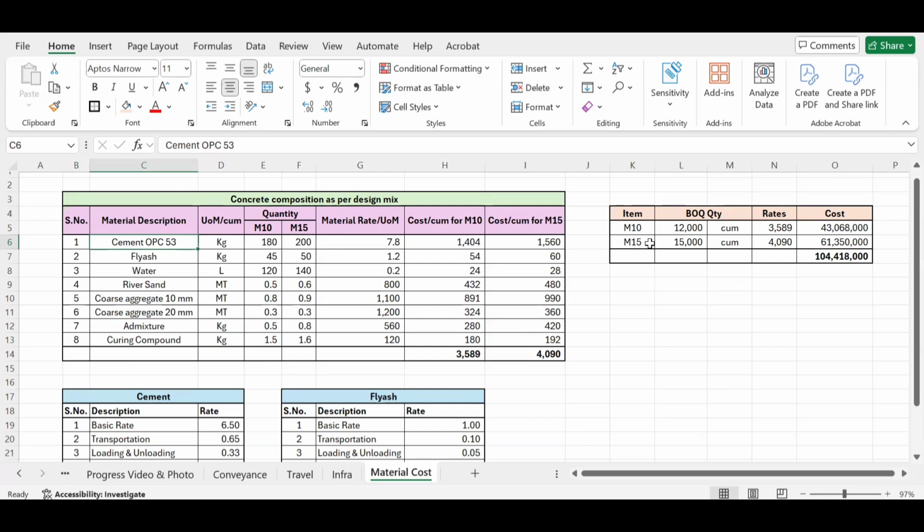They will have the knowledge of the standards and codes that are being followed in your country, for what proportions to take for what particular item, and based on that they will be calculating their complete breakup of the quantities for producing 1 cubic meter of concrete. So they have given me these quantities, which are unit quantities for producing unit concrete.